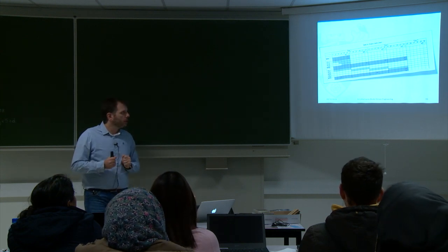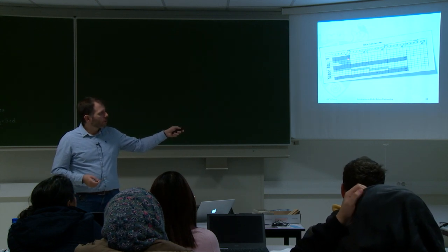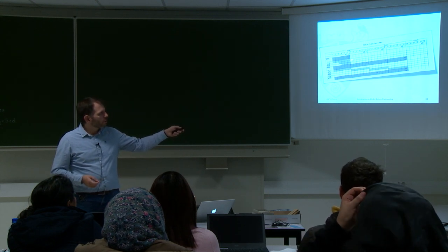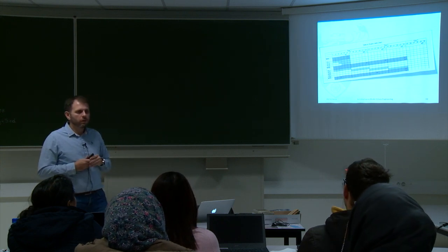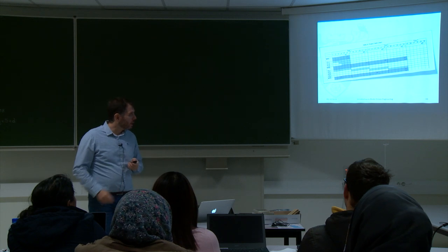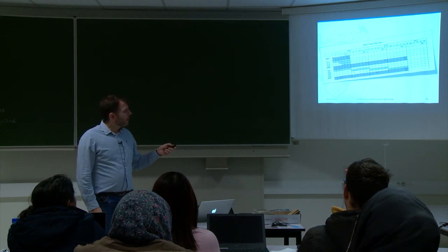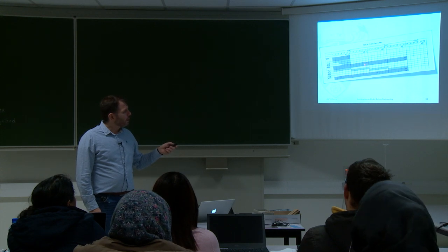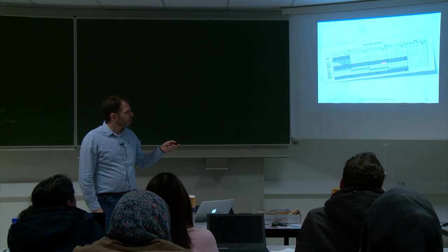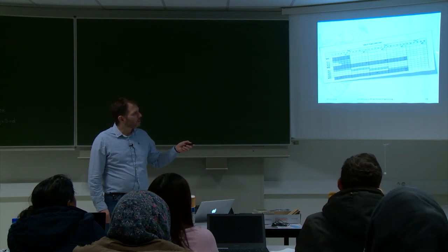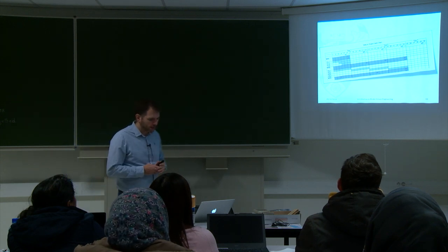So as you can imagine, it's very, very easy to get this wrong, right? To have a task that, for example, outlives its work package. So it would be fine to have a task that kind of goes into month 7 here. If we were just using Word, it wouldn't care. It would happily let us do that. Or, for example, we could have deliverables that are outside of the scope of a work package. Or we could have work packages that extend after the end of the project. There are all sorts of things that can go wrong.